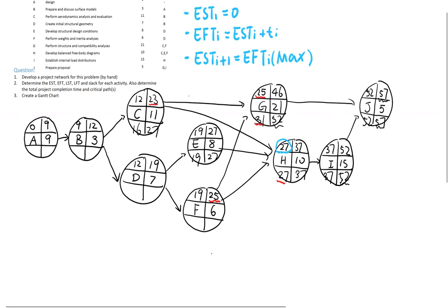And for activity F, we are choosing between day 31 or day 27. And again, that should be 27. 21. And here we are on the latest finish time of activity D. That is a value of either 19 or 21, and the value should be 19. Okay, and 12, 9, 9, 0. Okay, that completes the backward pass.